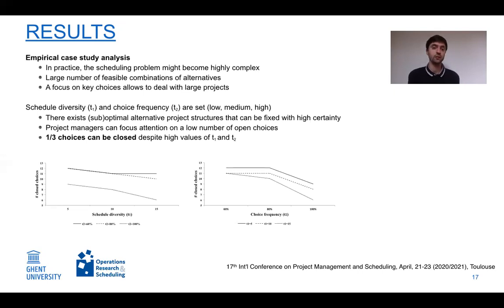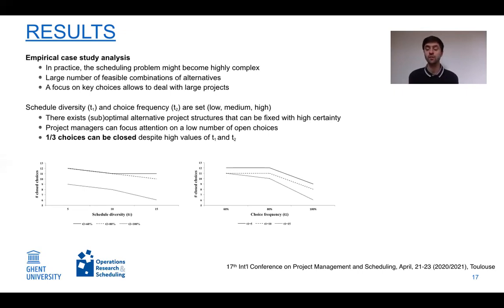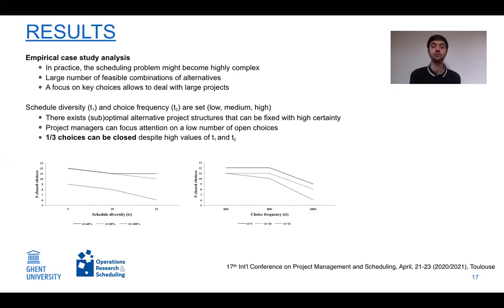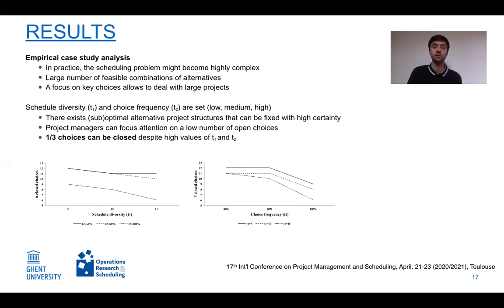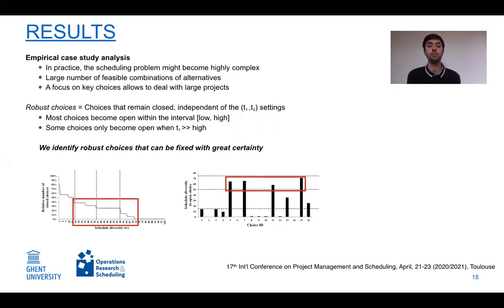When we increased schedule diversity T1 and choice frequency T2 from low to high values, the number of closed choices decreased as expected. However, we could still identify suboptimal alternative project structures fixable with high certainty, allowing project managers to focus on fewer open choices. Concretely, one out of three choices could be closed even for worst-case settings of T1 and T2.